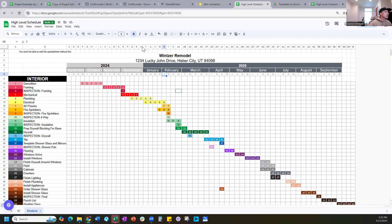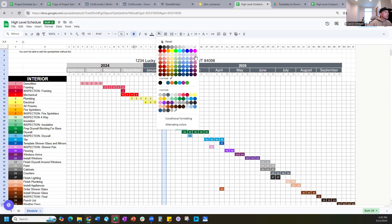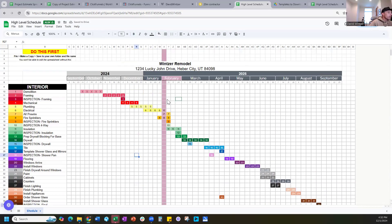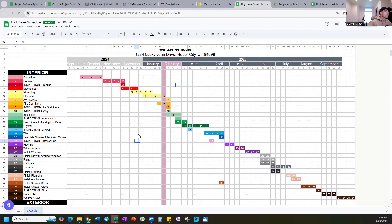Something I like to do is click on the current week's column — say, February 3rd — click to highlight the entire column, and change it to a magenta color. Now magenta equals this week. When you sit down with your team it's very clear: it's the week of February 3rd, and you can track exactly where you are against every task on the schedule.